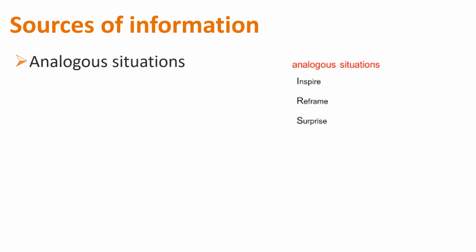Now, where are you going to get the information to help you estimate? You're going to look at situations that were similar, right? Analogous situations. What have we done before that's similar? That's where I was talking about the parametric. It pulls from historical understanding, expertise, ideally in your organization.